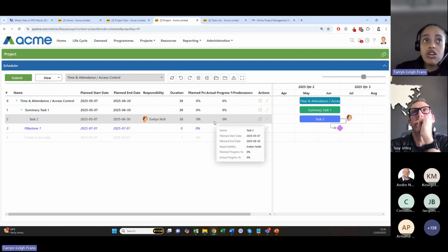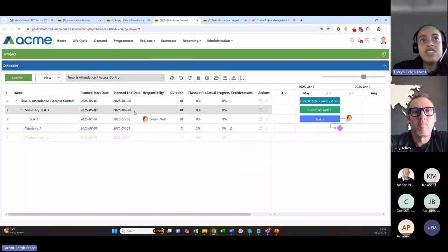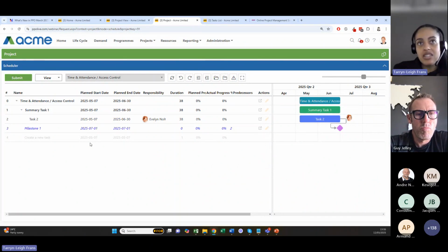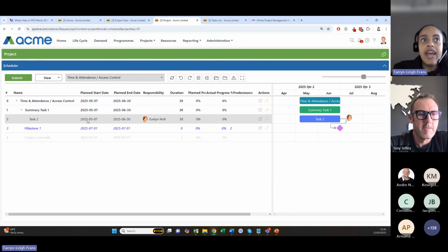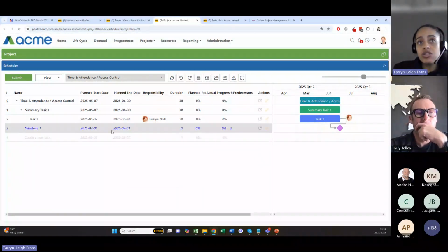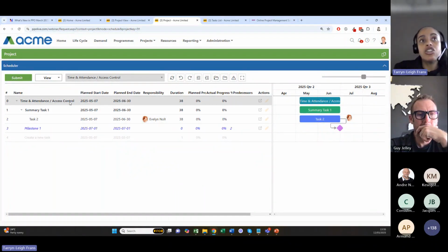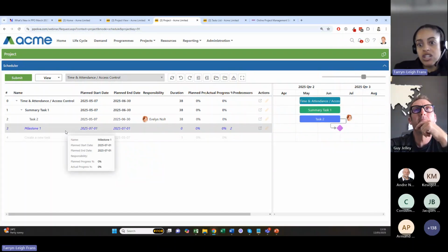So the scenarios under which that could happen is if you orphan any work, if you're going to delete tasks, if you're going to make changes to the underlying information. Previously, the task list remained static, but with the scheduler, as you update and submit and change information, a consequence of that would be that you're potentially changing the start and end dates of the overall project.